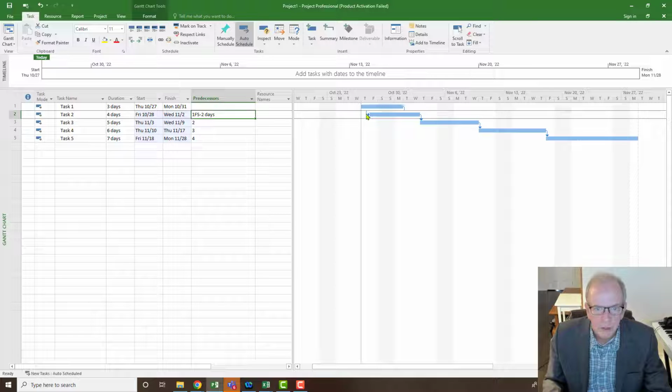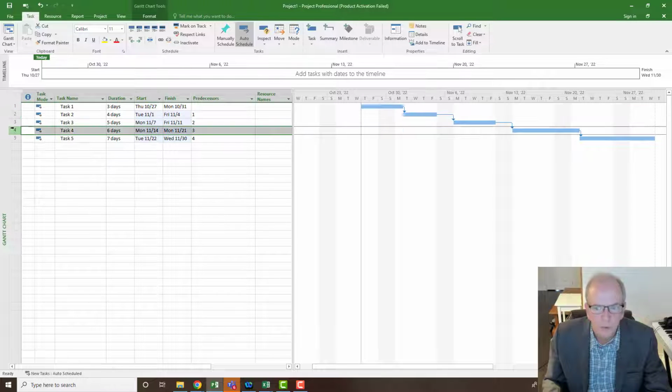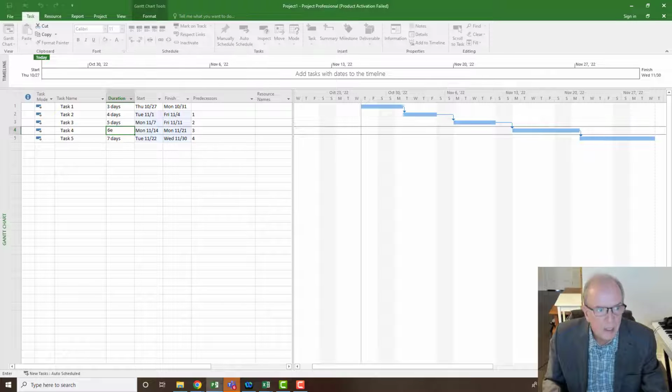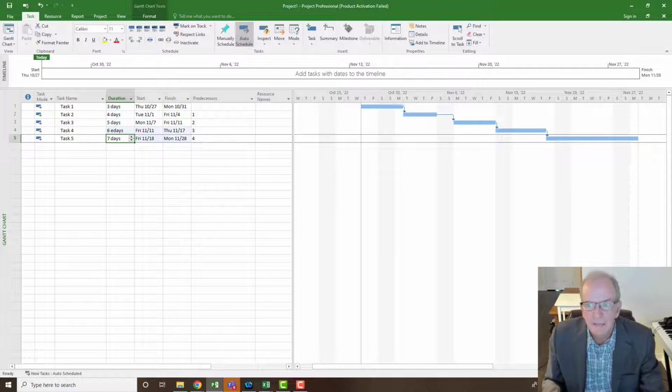So I'm going to double click on this. I'm going to bring this back to 0. So I'll bring that back to 0. Now we're normalized here. So if I wanted to say something, like this activity here, task number 4, it's 6 days. If I wanted to make it count calendar days, I could just go 6 ED, right? And that's elapsed days, right?